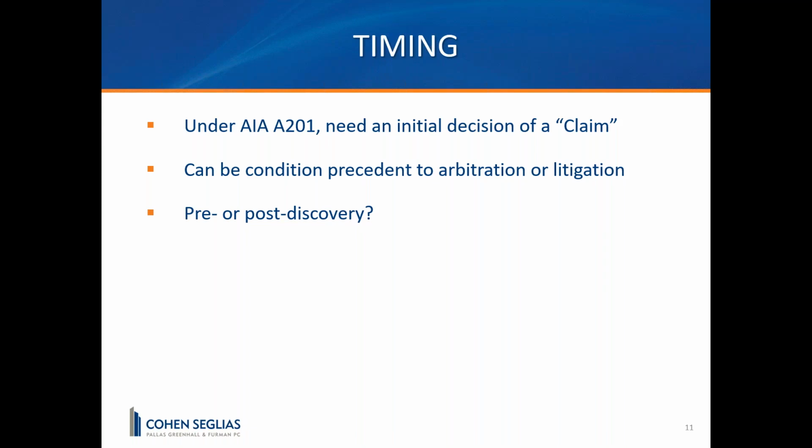So if the contract requires mediation during the process, there's a substantial likelihood that the parties may not have sufficient materials or data to actually carefully and properly evaluate the claim. And even though the parties may hold off with mediation until the completion of the project, there still remains a high likelihood that the parties may not have learned enough about the dispute at the conclusion of the project.